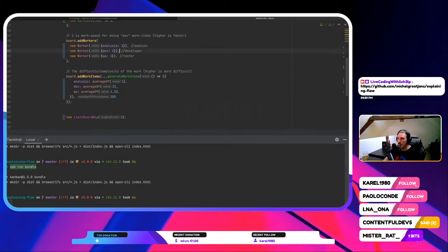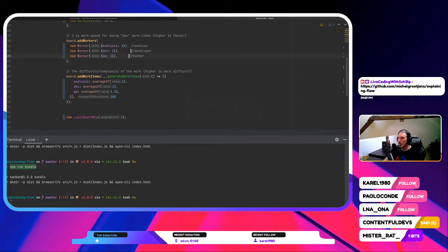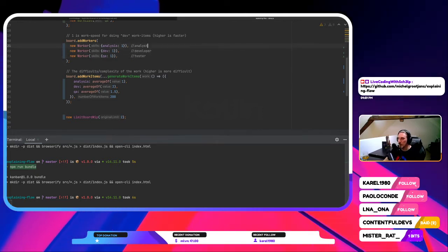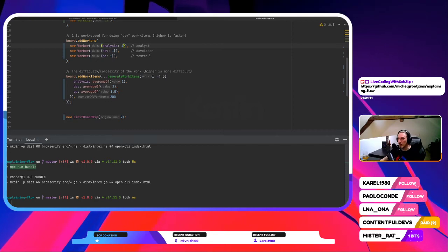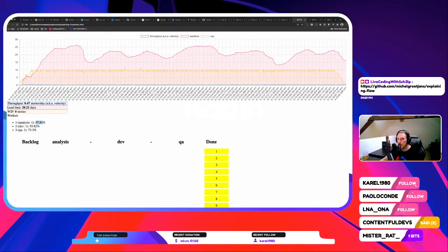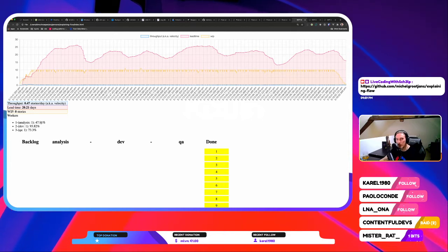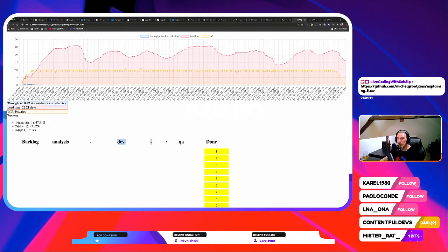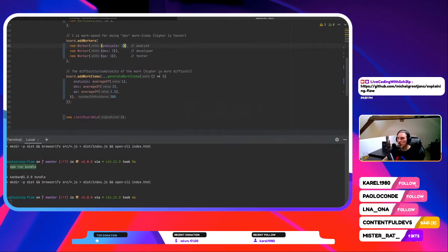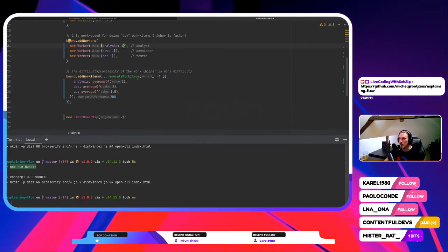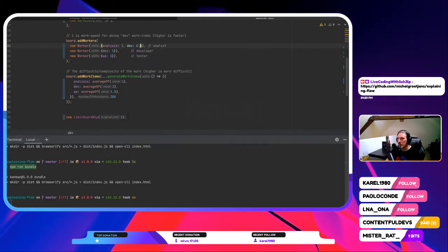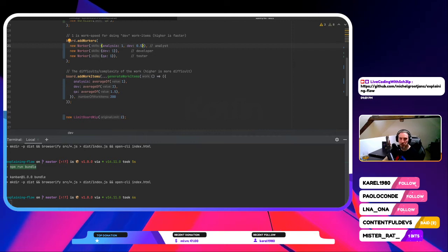One thing that we can add as a way to maybe improve the work is by making all of these a little bit more T-shaped. So in the time that an analyst is taking, so half their time basically, that they have to wait for a new work item that they can pull in, so they must wait until these things progress further down, what if they invest their time a bit in learning about development? So let's say that this is an analyst, and eventually maybe they can work as a developer at half speed. I'm just saying.